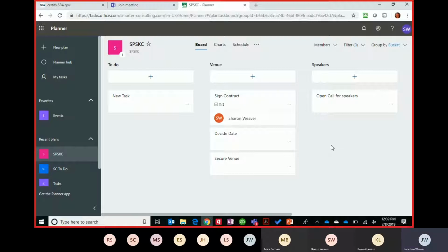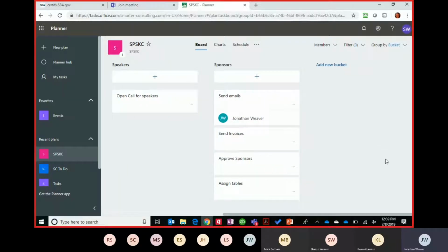Sharon, did you create the titles for those categories, or was it a template? No, I just went through and spun some of these up so you guys have some. I do this for all my demos on this. So to make those titles, you just do add new bucket, and maybe call it food, right? And then see how when you hover, everything's in context now. All the menus are context menus. So when I hover over food, my little dots show up, and now I can manage that particular thing.